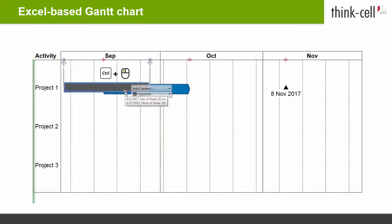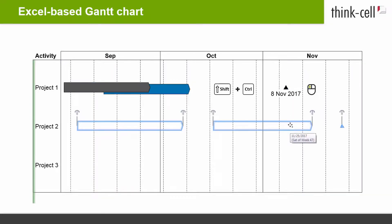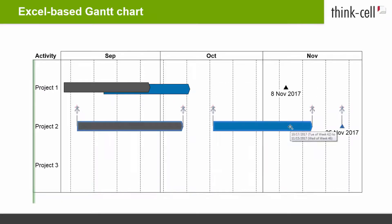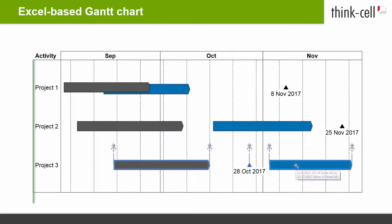Then, select all items you added to the initial row, hold down the Shift and Ctrl keys, and drag the selection to the next row. The items are duplicated and anchored to the corresponding anchor points in the next data row. The Shift-Ctrl drag shortcut is the same used for PowerPoint shapes, where Ctrl dragging duplicates shapes and holding down Shift additionally aligns them appropriately.